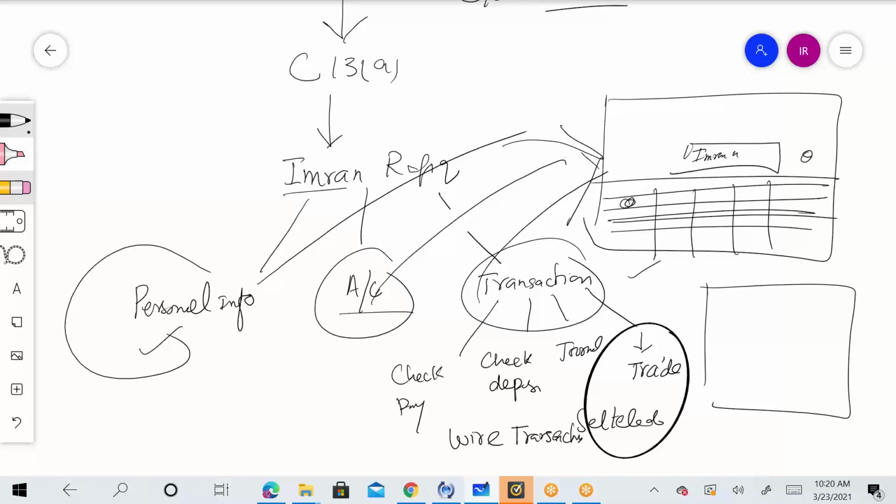When I joined the project, they already had a BRD, and BRD was defining their problem. BRD was defining what is the scope of the project. BRD was also highlighting the high level business and data requirement. And then BRD was also highlighting the major issues or risks, assumptions, dependencies, which we might face in terms of implementing this solution, in terms of developing the solution, what kind of challenges we can face. So it's a very high level 5 page document. That was the one document which was given to us.